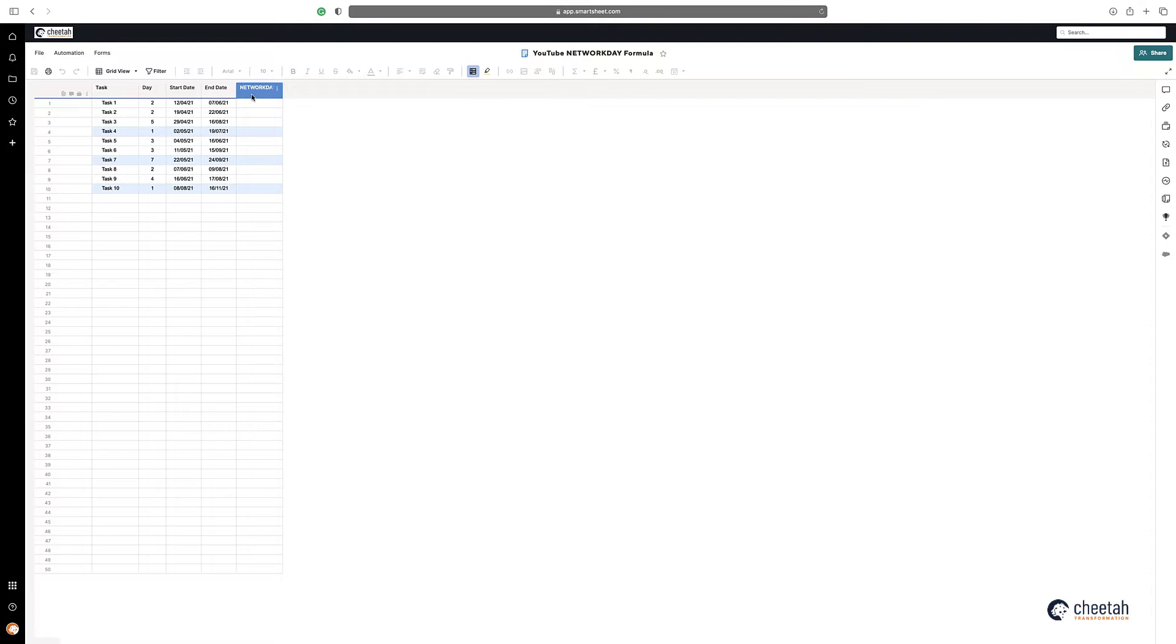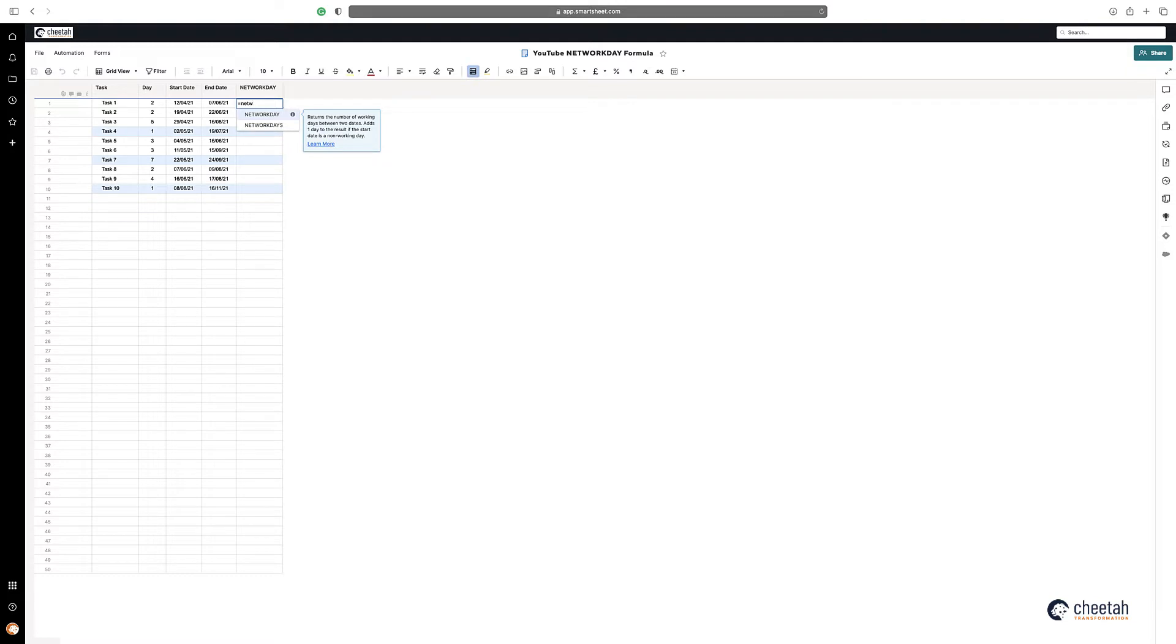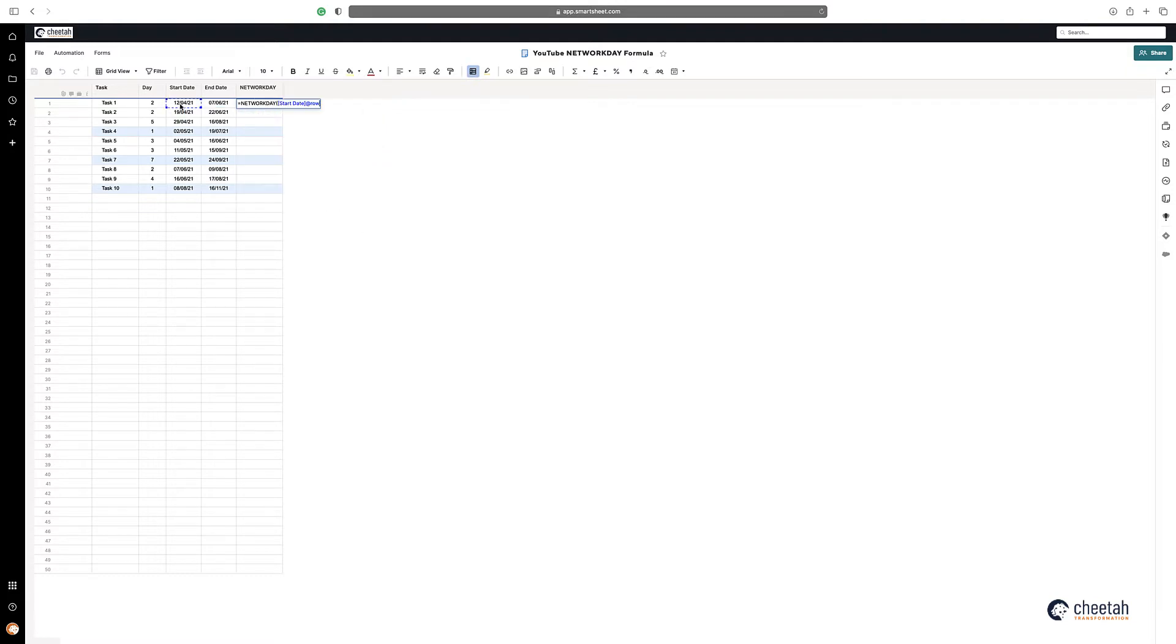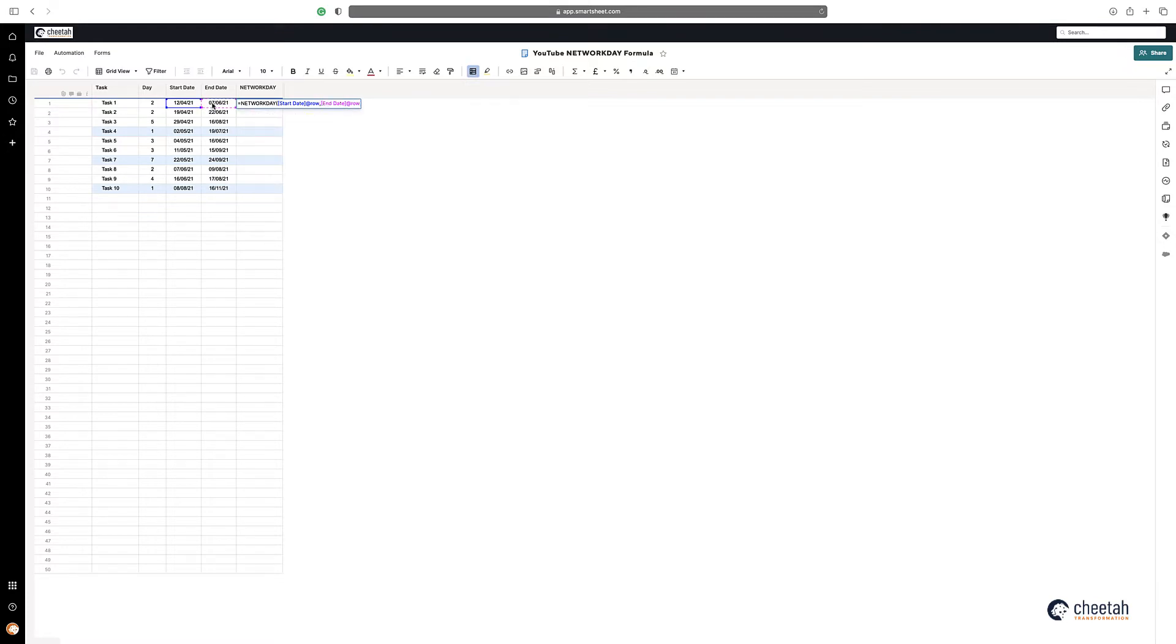So how to calculate the number of days: you can see the numbers, NETWORKDAY, highlight the start date, comma, and then the end date. Like you see, it's 421 working days between these two dates here.